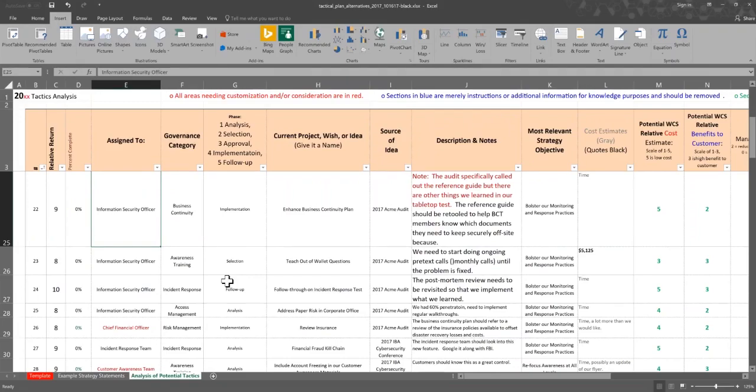Well, that way, because there's going to be a lot of tactics, by the way, that span more than 1 year. And so that way, then you maybe just change 2018 to 2019, but everything that's been completed that has 100% over it here, you can filter out because it's from the 2018 plan year, and it's no longer necessary to keep tracking it. So I hope that answered the question.